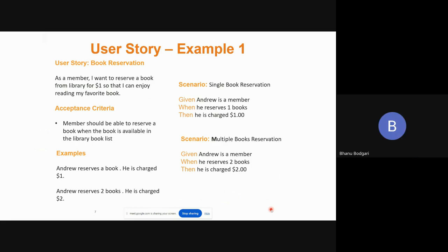By default we already have everyone attending that backlog refinement. So that would be the best placeholder for me to get started with, because if we invent other meetings, then it will only become overhead. People might say, okay, now we are giving them additional meetings, additional tasks and all that. So by using the current backlog refinement calls, we are not going to impact the development team, or even the stakeholders, or even the product owner with any extra things.